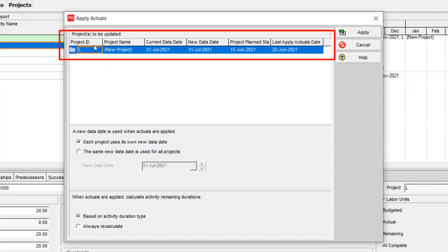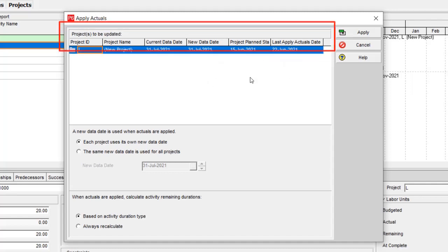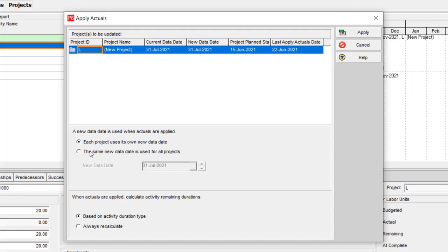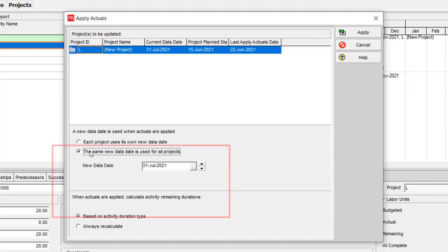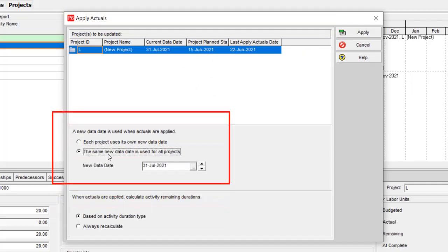It includes Project ID, Name, Current Data Date, New Data Date, Project Plan Start, and Last Apply Actual Date. But this data should be limited when you select the same new data date is used for all projects.